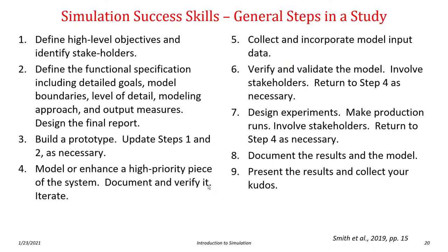Design the experiments, so make production runs. So you have an experimental design, you then run your simulation according to that experimental design. And again, you involve the stakeholders in this experimental design so that everyone's in agreement when the results are reported. You might have to return to step 4 again, depending on what the results of the runs are. Finally, document the results and then present the results and receive your kudos. So these are typical steps that you would follow in doing an actual simulation project.